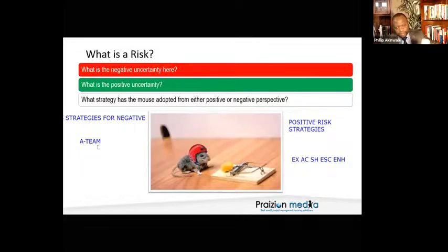What's that? Active accept? Accept? The safest answer is accept, my friends, because you do not know what Phil is going to do with that. You don't know whether he's going to use it. In fact, a very tricky examiner would say it's passive accept because you haven't been told anything that would generate action.